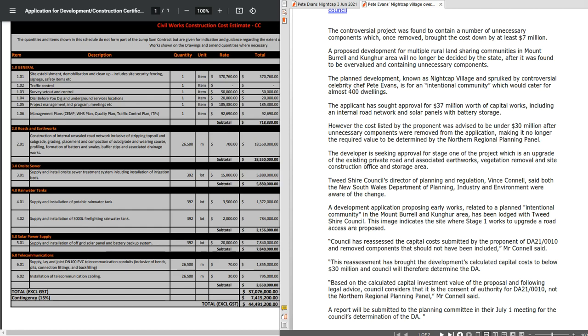So by the estimations of what had been already brought up, if you take out everything that isn't their cost and only cost it up with what would be their anticipated costs, you could only come up with about $21 million. So the council wrote to the developer and asked them to provide a revised costing. The result of that revised costing was that it put it under $30 million dollars, and the authorizing consent body is now no longer the Northern Regional Planning Panel. It is now gone back to the Tweed Shire Council. It is the Tweed Shire Council who will make that decision.